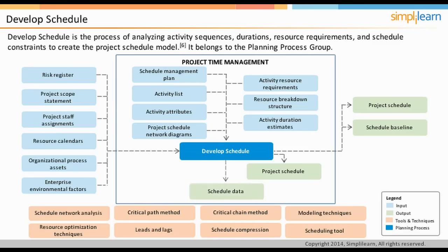Schedule data produced may include number of resources, key milestones, etc. Project calendars specify the available working days and the number of shifts in each day. They indicate how many hours and days are available for the work of the project to be completed.